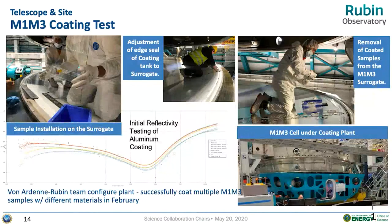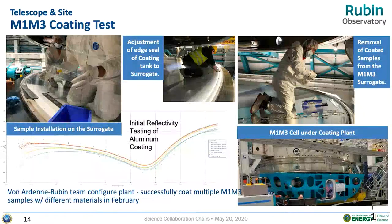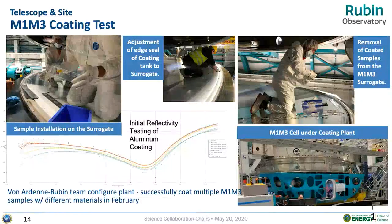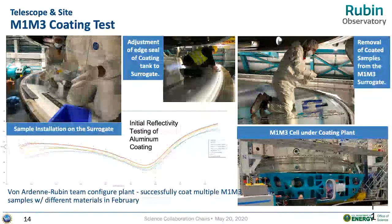Just before the COVID shutdown, the coating system contractor came back from Germany and worked with us to do a full-scale prototype run for the M1M3 aluminum coating. That was generally successful — functionally it went well. The performance of the coating is still being investigated; it met spec in some places and missed spec in others but not by much, and we'll work on that during the interim.